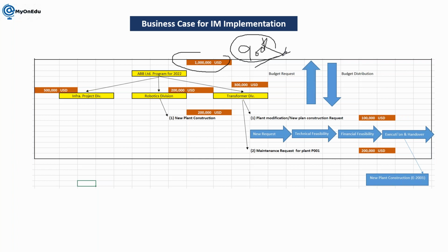This is a concept here in SAP. What we are planning is my plan cost, and what is approved is my budget. So the budget is going to control. Whatever further transactions you execute in the system will be aligned with your planned budget, and that will be controlled. You cannot go more than what you have planned in a budget.